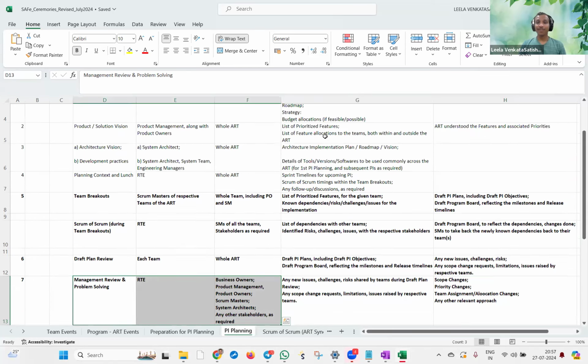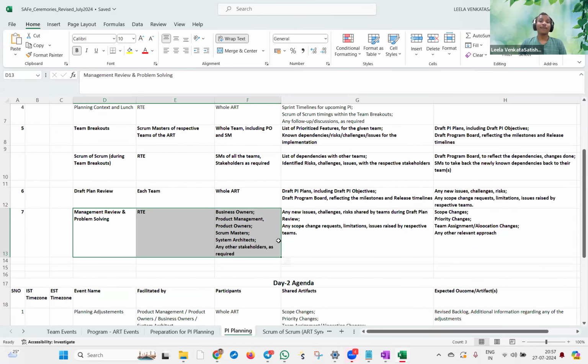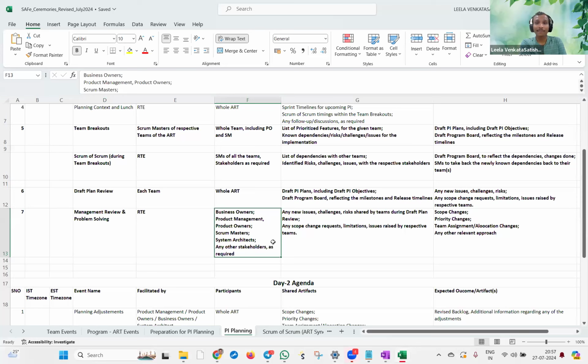And that is where the budget allocations also come into context. Sometimes the discussion might be, hey, for facial ID, for example, instead of spending $1 million to get that implementation done, which might need one PI, what if we go for a ready-made solution from a third party, which might cost another 50K, but we might get it immediately?